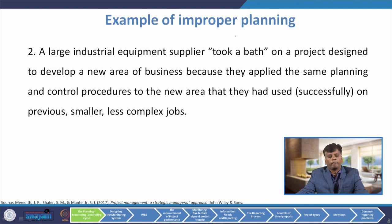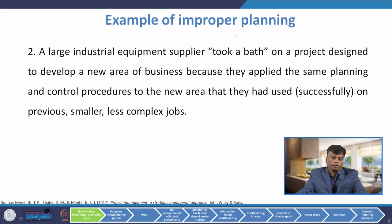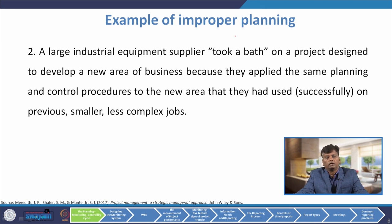A major construction project ran over budget by 63% and over schedule by 48% because the project manager decided he had managed similar projects before and knew what to do without going into all the details. This is the outcome of improper planning. A large industrial equipment supplier made a loss on a project because they applied the same planning and controlling procedures to a new area that they had used on previous smaller, less complex jobs. Things which have worked for one project may not work for another.